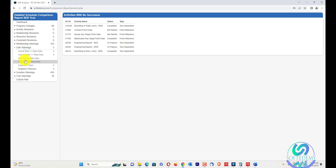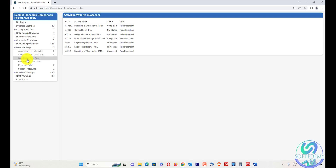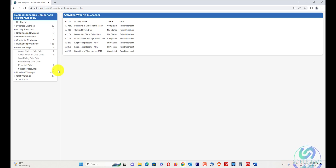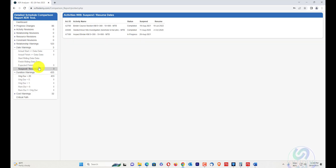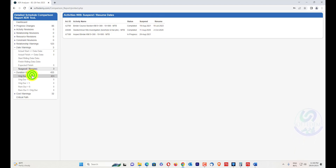Date warnings highlight issues such as: if your actual start is greater than the data date, if your actual finish is greater than or equal to the data date, writing start and finish date issues, expected finish dates where a deadline is frozen on an activity, and activities that have been suspended and resumed — all are shown in the date warnings section.